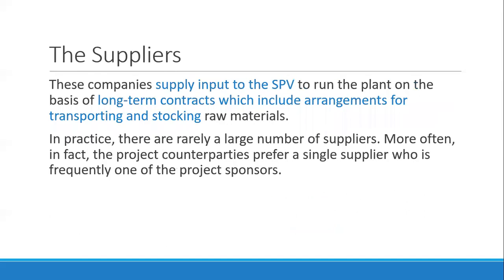There are also suppliers. Companies supply inputs to the SPV to run the plant on the basis of long-term contracts, which include arrangements for transporting and stocking raw materials. In the water sector, significant supply agreements likely cover chemicals, and there could be supply agreements with chemical suppliers assuring supply at a pre-specified price.